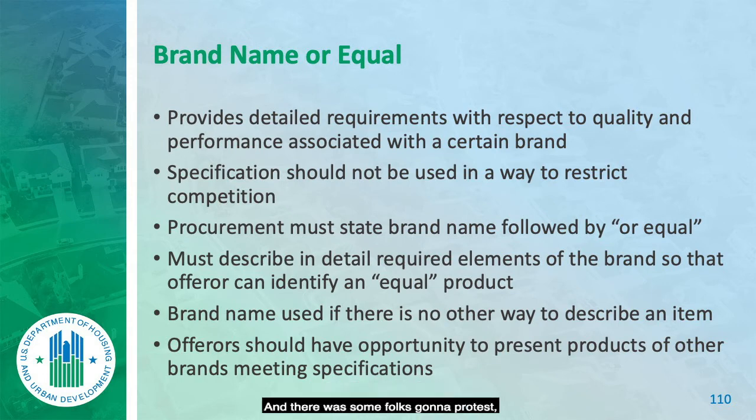And there was some folks going to protest, and I said, talk to your attorney. You can protest, but I want the recessed handle. Well, we don't have it. Well, it's the coming thing, so you better get it. And they did. They didn't protest, but the attorney said, well, we'll lose that because they have the right to name a specification if it's important to them. Always followed by the words or equal.